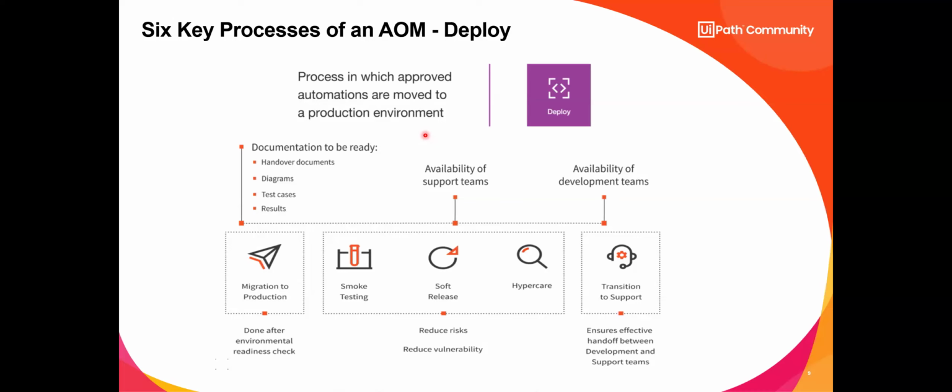I know we probably all know what hypercare means, but I'm going to say it in case somebody doesn't. It just means that if something does go wrong on an automation that's in hypercare, that automation has priority in getting break fixes. And when we break fix something, we also have to remember all this documentation needs to somehow be updated on what we fixed, right?